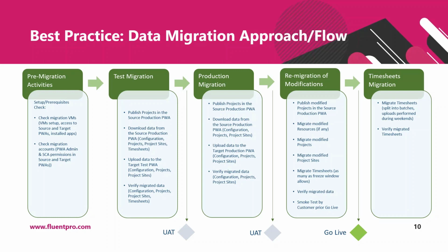When the test migration is completed, the test PWA is ready for the user acceptance testing, and we recommend engaging users with different roles like administrators, project managers, portfolio managers, team members, to check the data that was migrated and to check their overall experience with working with Test Project Online PWA.